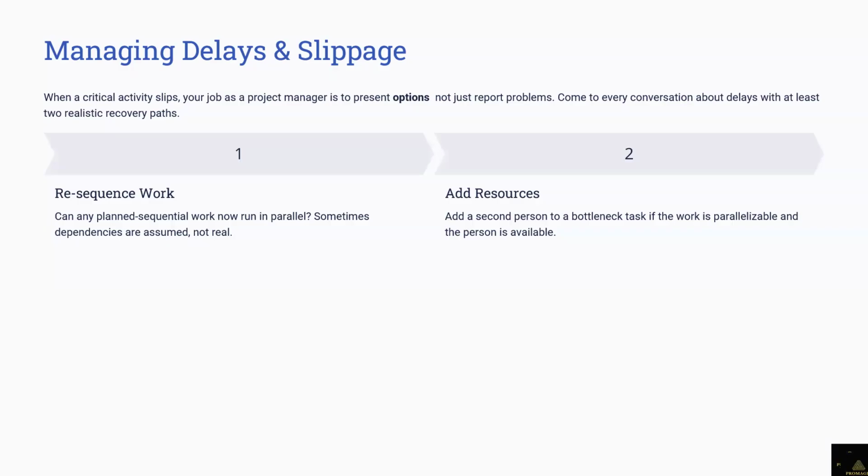Usually, the client knows the rates because those are the things you'll have submitted in your MSA. MSA stands for Master Service Agreement. Most of the time when you're working on a project, there's a Master Service Agreement, which is the agreement your company has with that company. It contains the terms of how you're going to be working with the client. It's just a contract between you and the client.